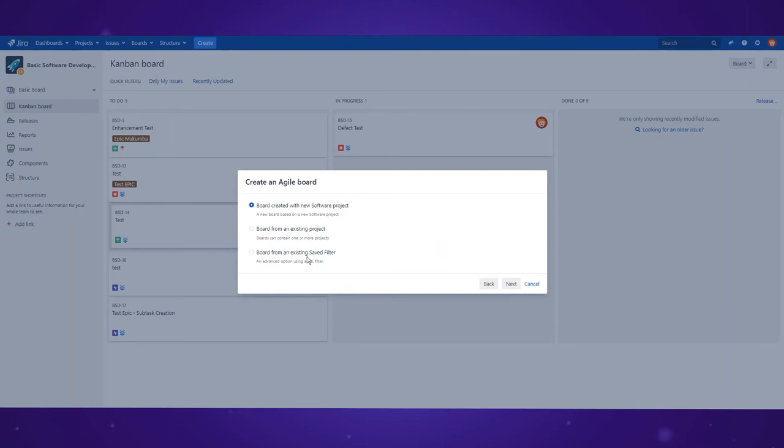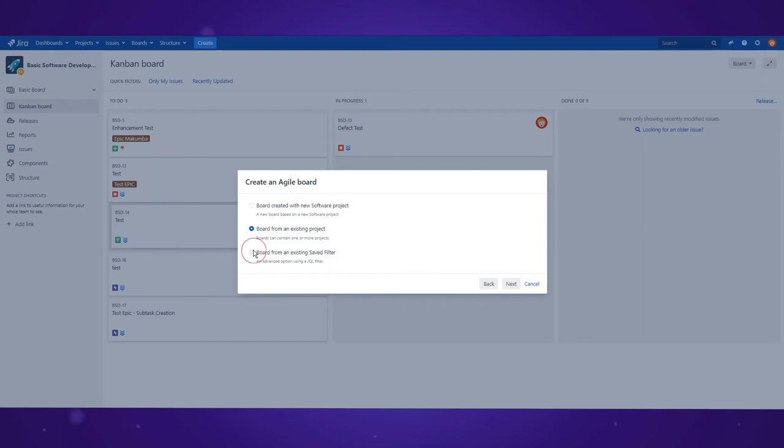You can either create a new board based on a new project, create one based on an existing project, or create one based on a saved filter written in JQL.